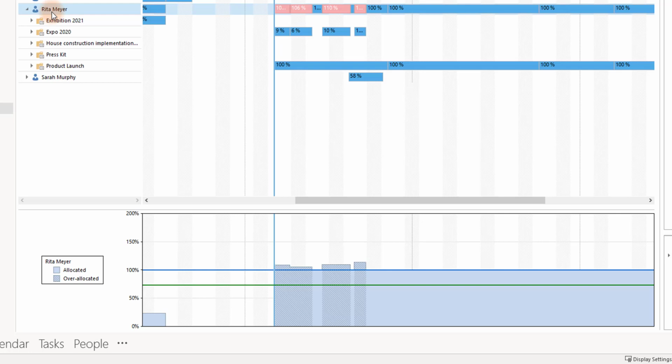The most important line, however, is the horizontal green line. That line shows you the average workload of a person or a team. So as long as team members aren't working constantly at capacity or even over capacity, spikes at certain times are normal.